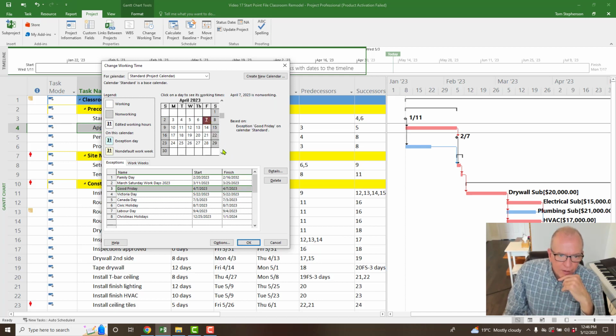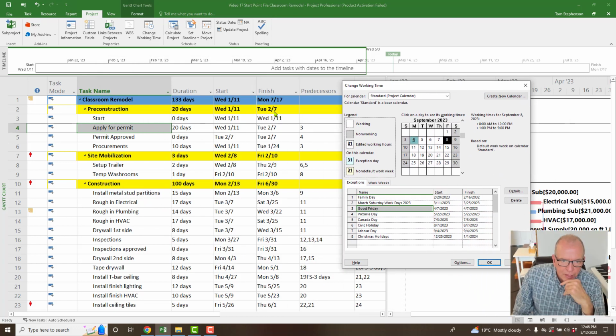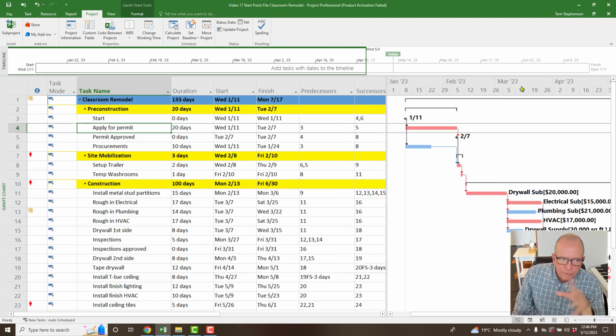I'm checking that I've got Good Friday, I've got Victoria Day, which in Canada we celebrate, I guess Memorial Day in the US, July 4th in the States, July 1st in Canada, so then we would get the Monday off, so that's looking good. First Monday in August we get off, Labor Day we get off, and then this project, it's over by then, right? So it's July 17th, so we're good. So I just checked that my holidays, I've got them all off the way I want them to be. So that's good. All right, going back to my checklist.